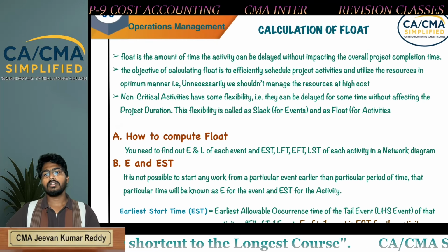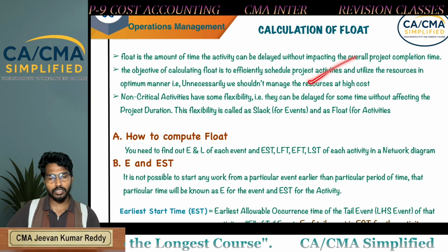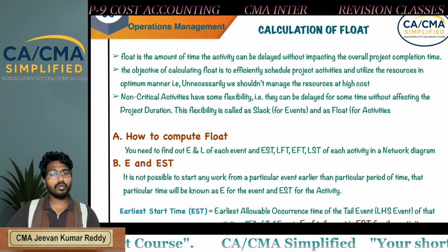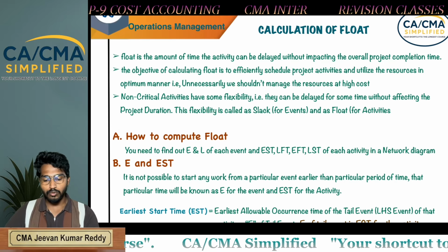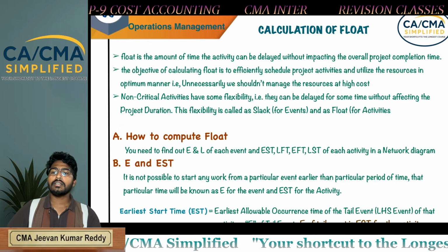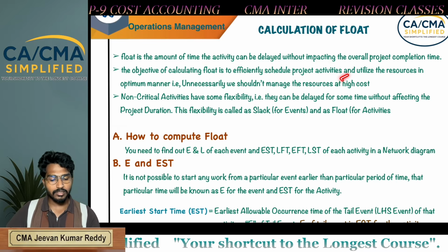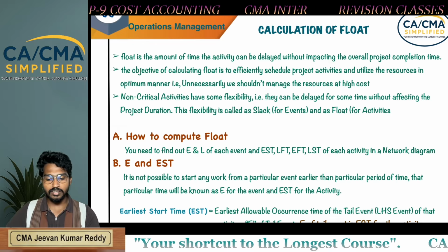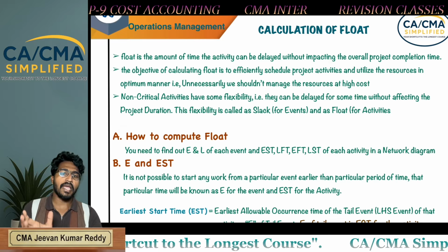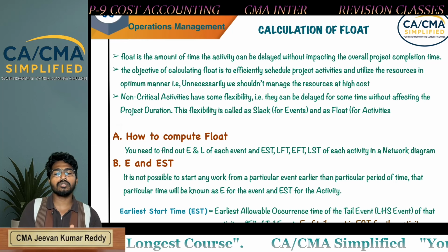Next, coming to our most important topic. Every time they are asking float only in the examination. What is float? Float is the amount of time the activity can be delayed without impacting the overall project completion. So float is nothing but delay of an activity without impacting the overall project duration. The objective of calculating float is to efficiently schedule the project activities and utilize the resources in an optimum manner. Unnecessarily, we shouldn't manage the resources at high cost. So the objective of float is to manage the resources in an optimum manner.